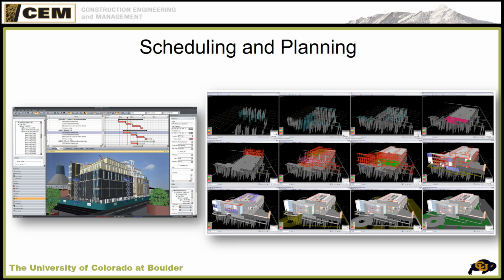Okay, some keys to success in scheduling. First one is to start building your schedule right away. So you're able to build a schedule without having the details. So any given office, we could build a generic schedule from the earthwork, utilities, foundations, superstructure, enclosure, MEP systems, finishes. We could come up with some pretty good ideas of durations and sequence just based on the type of building and the size.